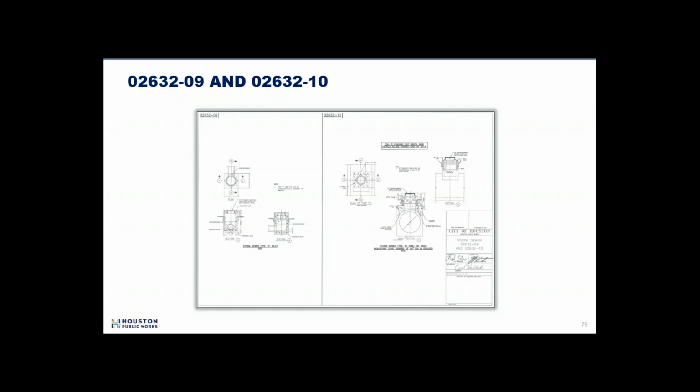And so the question comes in cast in place. How do we handle cast in place? Well, that falls back on the designer. If it's a cast in place element, the expectation is that the designer is designing that cast in place element, and there is direction to the contractor on how to build and construct that. There's differences, and when you're doing that, then that design needs to be sealed.